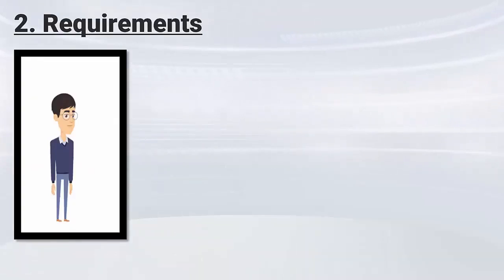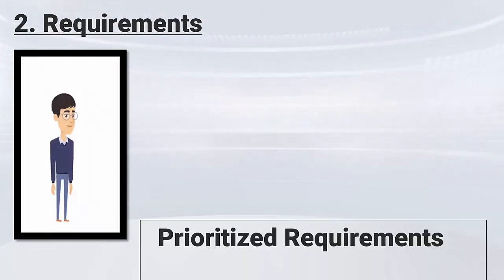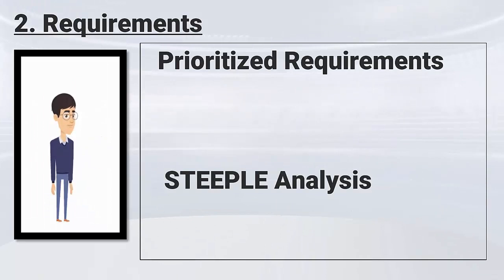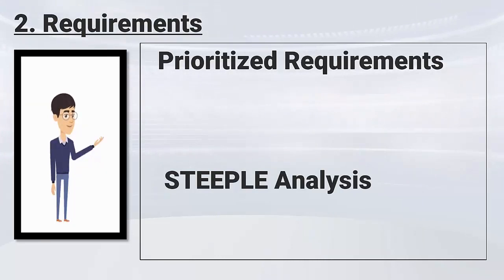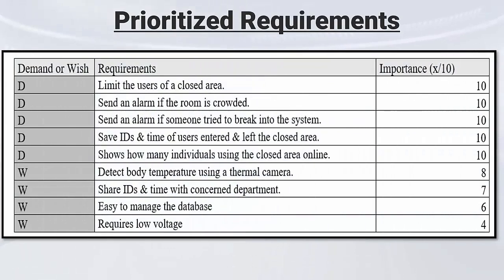The second main point in the video is the requirement. Requirements are conditions and features stated by the client that must be included in the project in order to ensure its success. The team has prepared two main parts: prioritized requirements and STEEPLE analysis. The prioritized requirements are the needs of the client sorted from the most important to the least important. There are two types of requirements: demand and wishes. In this project, the need to limit users of a closed area and save IDs is considered a demand with importance 10 out of 10, while use of low voltage is a wish with importance 4 out of 10.